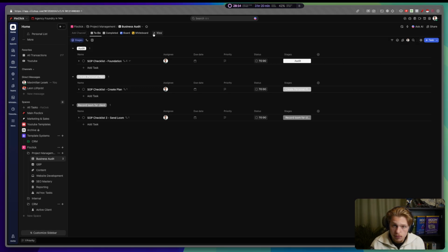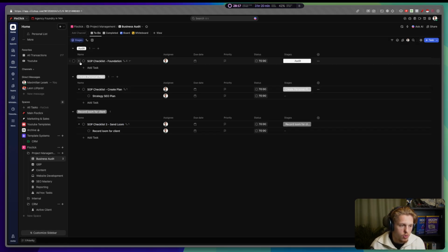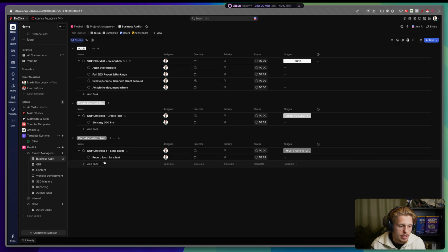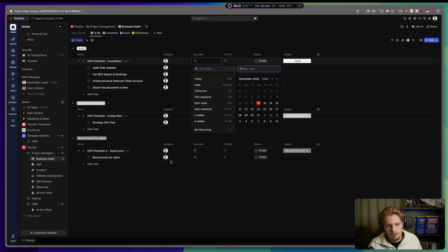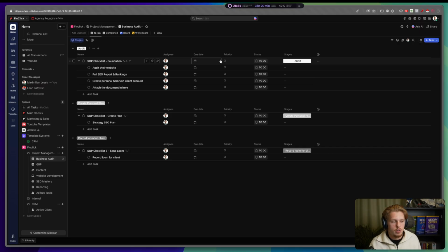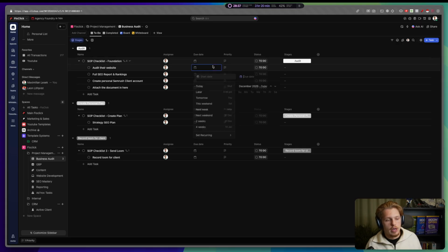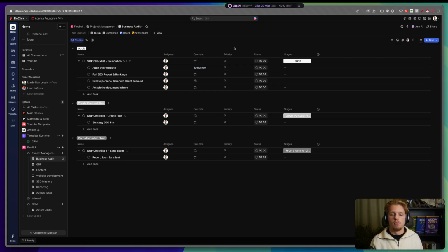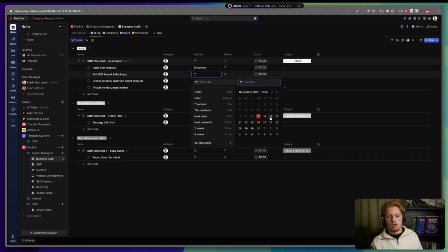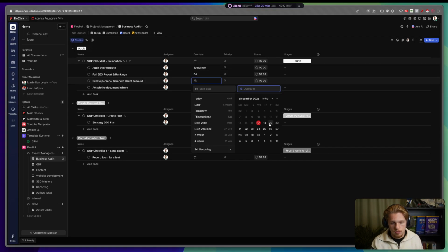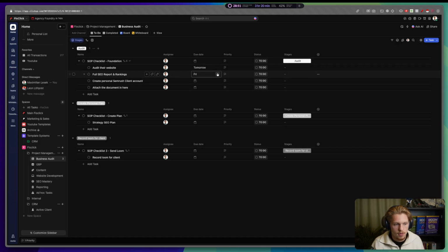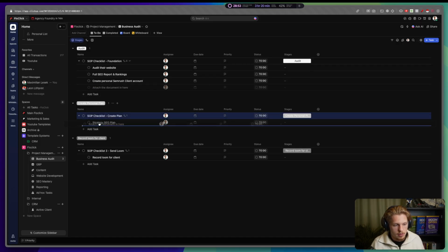So once you've done this for the department, I want you to create different stages, create different tasks you do. You can also do this tomorrow or do this after, and so on. That's up to you. Some people want to have, as soon as the client checks in, we have to get the audit done by tomorrow. Like 1 day after this thing occurs, right? Or this needs to be done 2 days after. And this needs to be done also 2 days after. And this needs to be done like 3 days after. And so on. I'm going to have this in there as well.